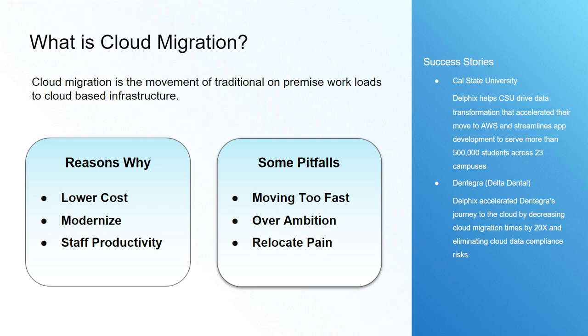Biting off more than you can chew, or overambition in a project. The Big Bang approach is difficult to pull off with a cloud migration. There will inevitably be hidden complexities that should be understood and planned for. And if you can pick the low-hanging fruit first, systems with the fewest dependencies, migrate those and get a feel for how that works, then you're much better off in the long run.